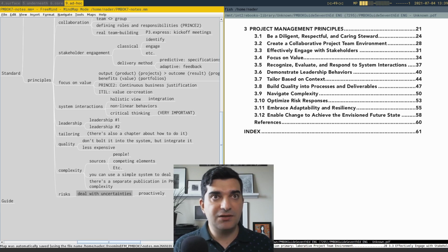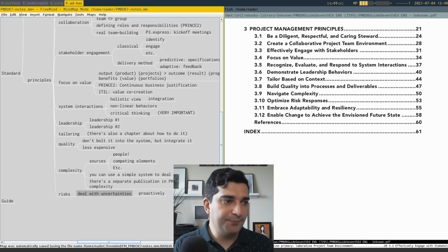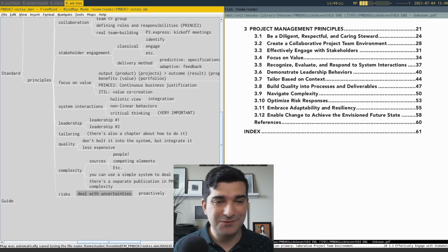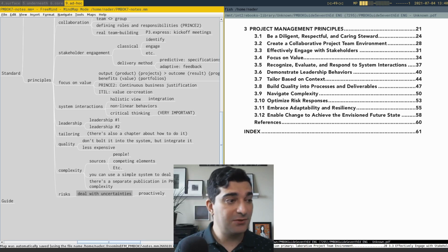When you take a look at risk registers, a lot of times what many people identify as risks are not even risks. They are the impacts of the risk or something else. For example, I've seen it a lot of times that they say, we have the risk that the project may be delayed. That's not a risk. Come on. So there are lots of resources about that. PMI has a publication about risk. Axelos has one, MOR, Management of Risk, which I really like. It's very practical, I think.